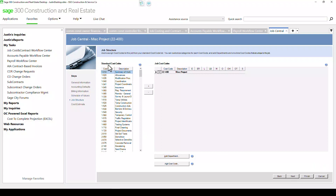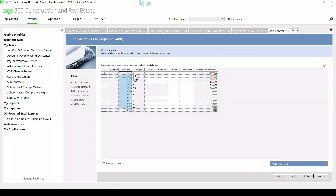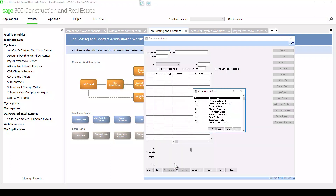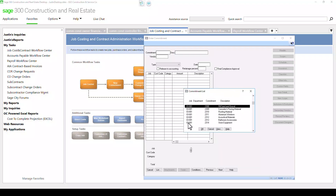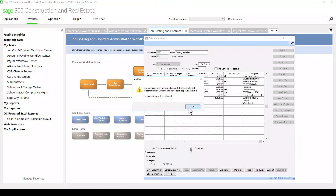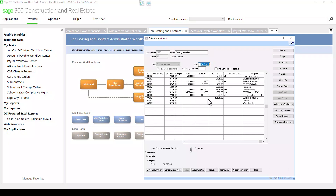As far as how we set up the job cost codes, this can come from Sage Estimating or be imported from a spreadsheet. The format is straightforward — it's just the cost code, the cost category, and if there are any unit costs and dollar amounts. Very easy to set that up. If we were to put in a new subcontract or new purchase order, we would just click New Commitments. I'm going to bring up an existing one for the sake of time, sorted by job — specifically the framing materials purchase order from job number two. These are the cost code items and the detail lines below.